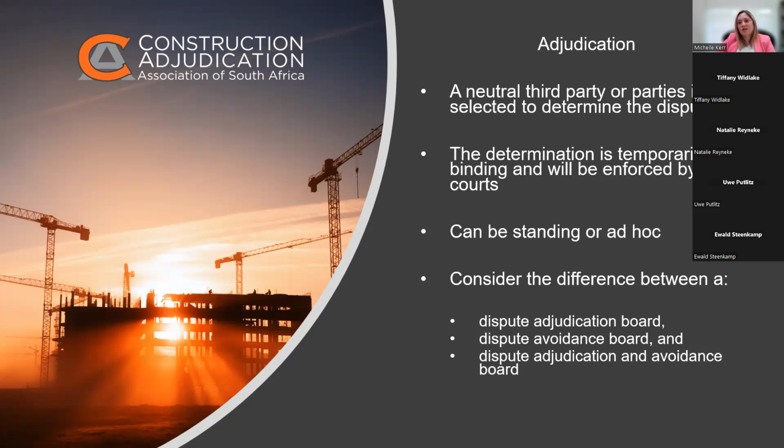He gets to say to them, look, if you were to refer this dispute to me and you spent a lot of money drafting papers, maybe you got some external legal advice, I would probably give you this opinion. It's not binding right now, but if you made the submissions to me in the proper adjudication process, then this would be my decision unless there's something else that I haven't seen that would change my mind.